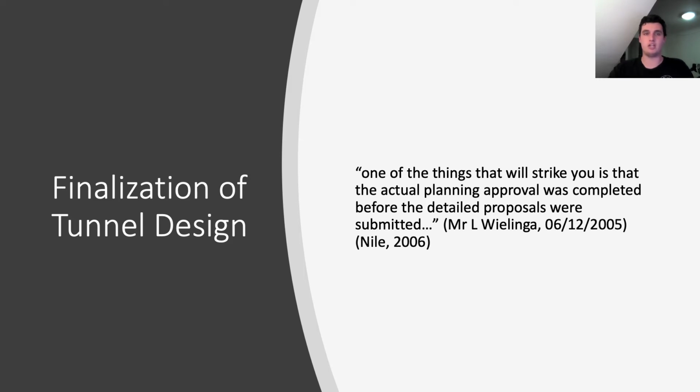Due to the changing design of the tunnel, completing environmental impact statements and getting the Minister's approval before a contractor was found resulted in significant delays to the project. Therefore, finalizing the design of the tunnel before getting approval will reduce the overall length of the project.